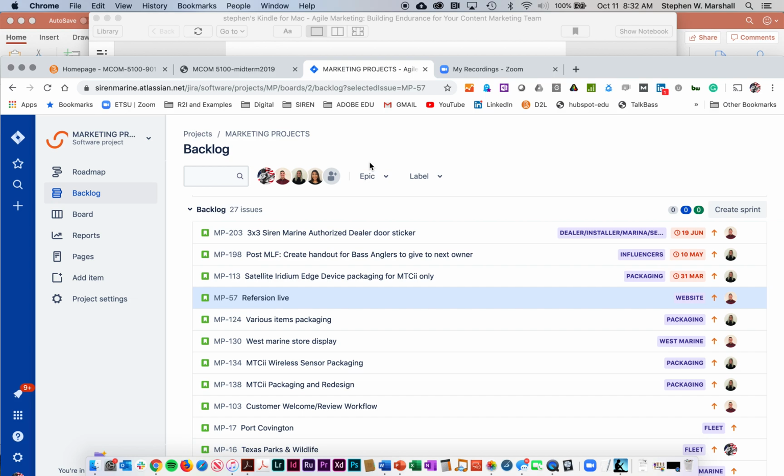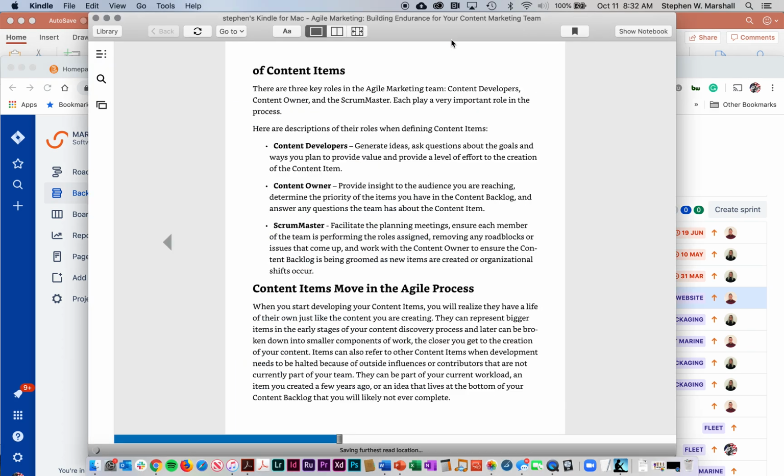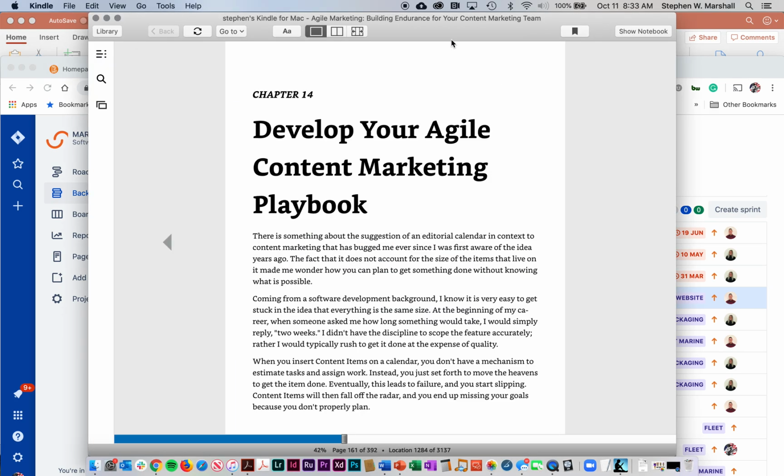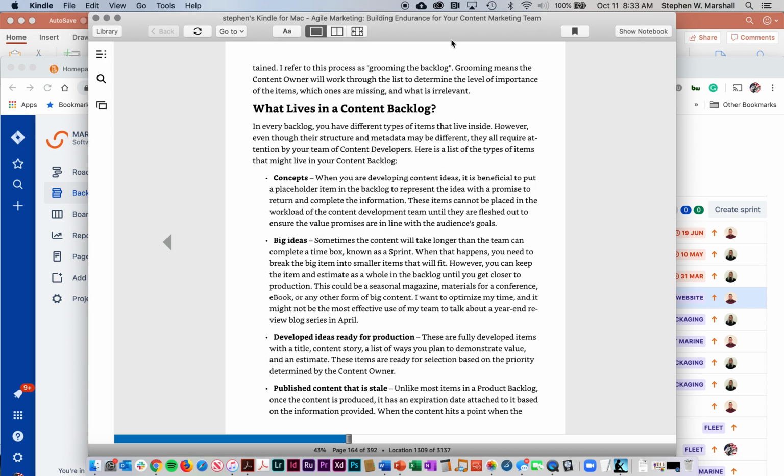and that's something that Jeff and I talked a lot about at the end of the thing yesterday. Because that's one of the hardest things to set up: what is the LOE, or level of effort, for a particular project? How long is a particular project going to take? Those are the things that it takes a while of moving through sprints to really understand: what is that story point? Is it worth an hour? Is it worth 3 hours? Is it worth 30 minutes? We want to assign some kind of measurable amount to each one of those points to understand how we are able to do work and what kind of work we're able to take on at particular times.